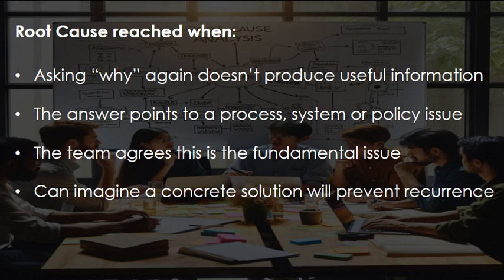In the example, if the root cause is "because the nurse forgot," you haven't gone deep enough. Ask why the system allowed the nurse's memory to be the only safeguard.